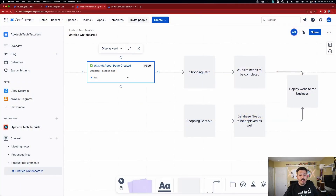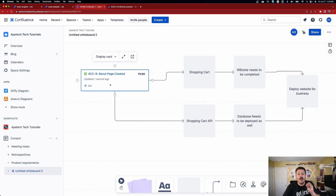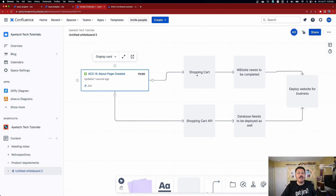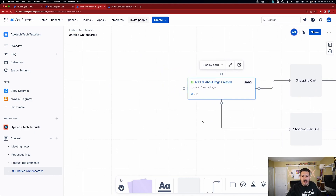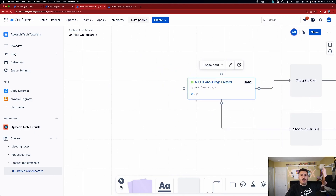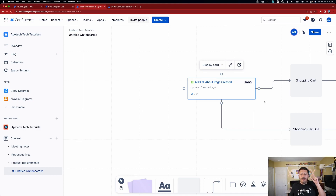Now we understand order of operations. When you go to plan things in Jira, you have the order of operation because you know how they're related and which issue needs to come before the other. So this task — let's say AAC9 — has to happen before we start on the next ones. Your team can visually see that this is a precursor to anything on the right side of it, and you can go to the left to further decompose dependencies. It shows timeline and order of operations — a very great visual way for your team to understand the importance of which issues need to be completed first.